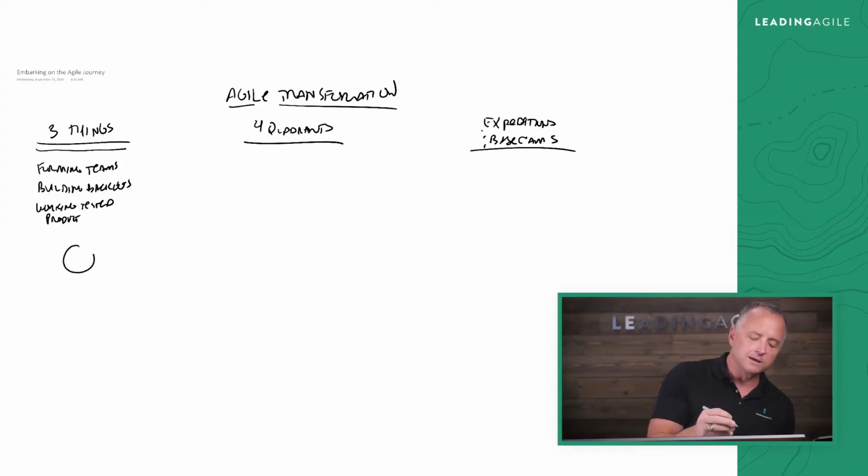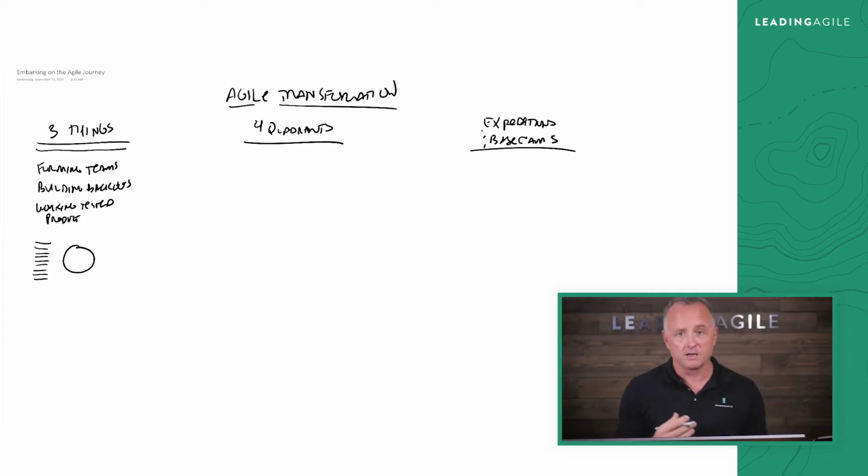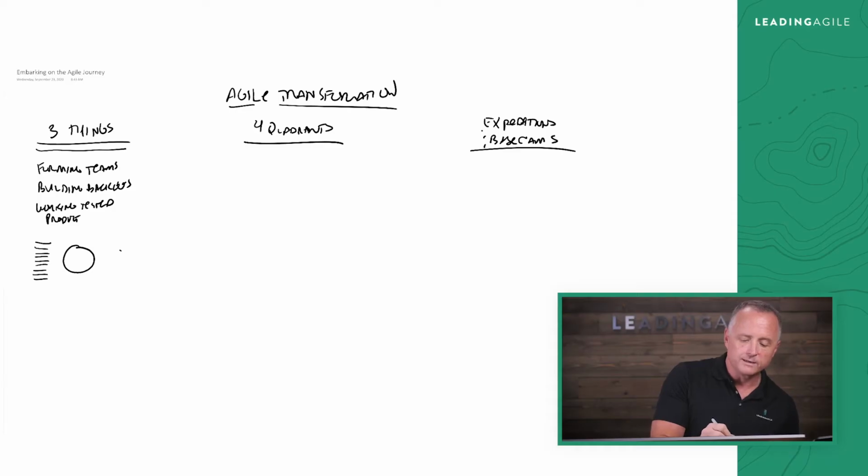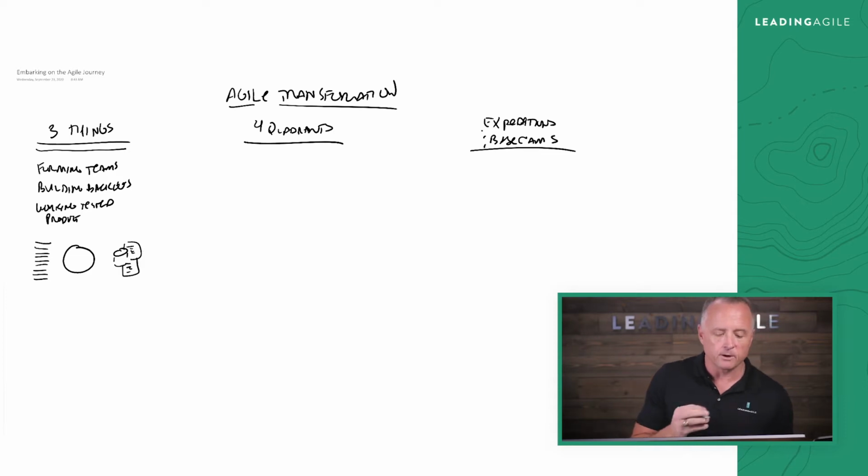And so this idea of forming teams, getting them a really clear backlog, right? And by backlog, I mean what we learned from Ron Jeffries back in the day, a card, a conversation, a confirmation, and the INVEST model: independent, negotiable, valuable, estimatable, small, and testable. Backlogs are epically bad in a lot of the organizations we go into. And then the ability to produce this working tested increment of software that actually provides some value to the customer.